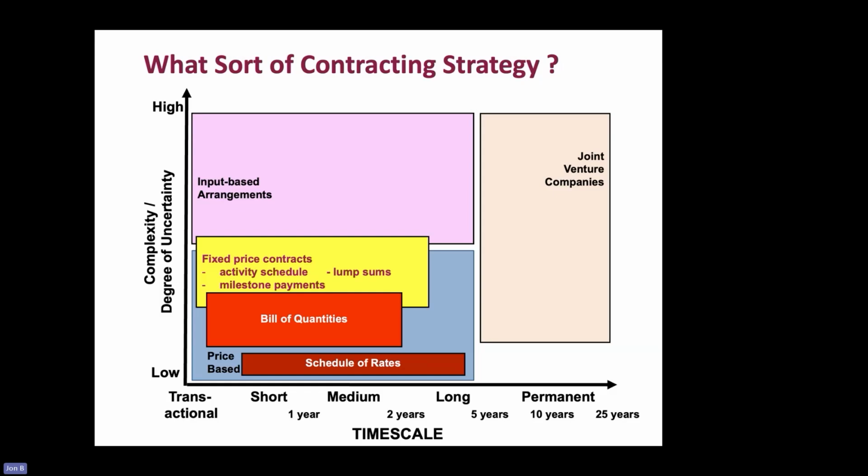because you don't want it broken down into hundreds and hundreds of activities, because you start getting into measuring as you do with bills of quantities, and that takes up time. But if you don't allow enough, then the contractor will start to amalgamate activities into the ones in the activity schedule.